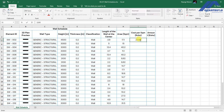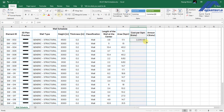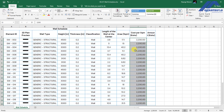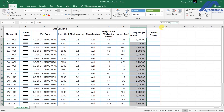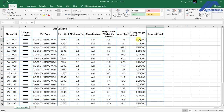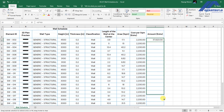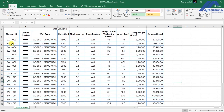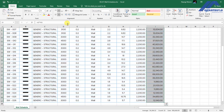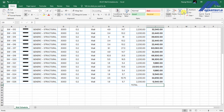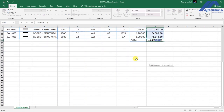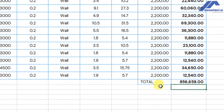The cost per square meter of a wall is 2,200 shillings. Enter that and copy it to all cells, because we have the same thickness for all walls represented here. For the amount column, the value is given by cost per square meter multiplied by the area — so equals this cell multiplied by this cell. Copy that formula down to the very last row so that for every wall, for every element ID, we have the cost given. To get the total cost, add a 'Total' label, click on the amount cell, use AutoSum, then press Enter — the total is 856,658 shillings.